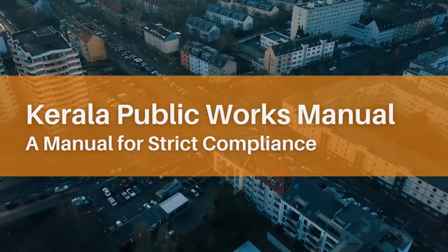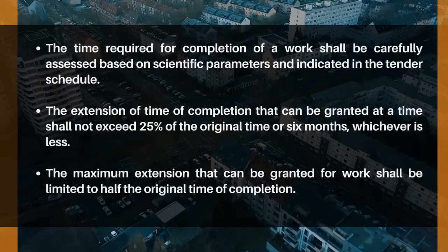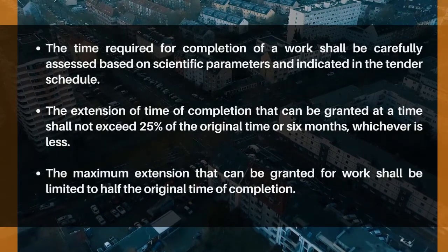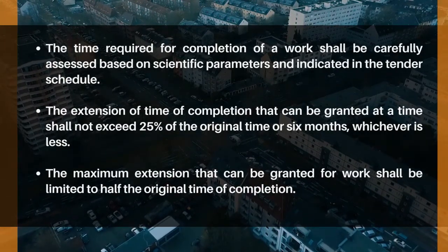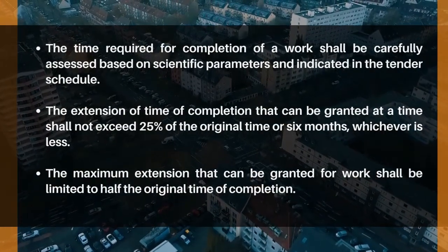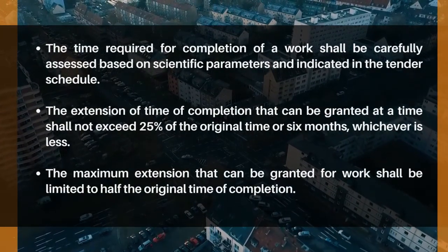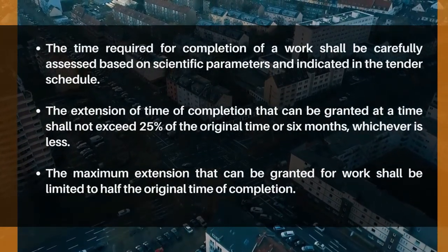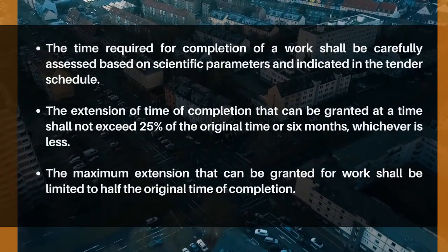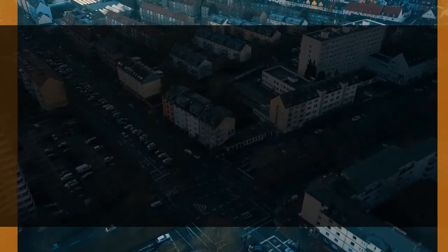Now we talk about Kerala Public Works Manual compliance. The time required for the completion of a work shall be carefully assessed based on scientific parameters and indicated in the tender schedule. The extension of time of completion that can be granted at a time shall not exceed 25% of the original time or 6 months, whichever is less. The maximum extension that can be granted for the work shall be limited to half the original time of completion.